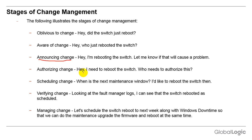It is always better to have a proper change management system. In authorized change, the person asks who needs to authorize the switch reboot — this is part of good change management. For scheduling change, the question becomes: when is the next maintenance window? Restricting a change until the next maintenance window is always a better option, because interruptions to services always cause trouble.